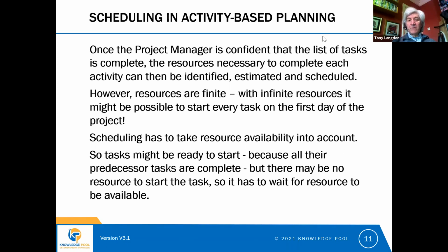But one of the things we need to consider is that resources are finite. If we had an infinite number of workers, then it might actually be possible to start and finish every task on the first day of the project. But we don't have that luxury. We don't have an infinite number of resources. So we have to schedule the project tasks, taking into account the resource that's actually available to the project to do the work.